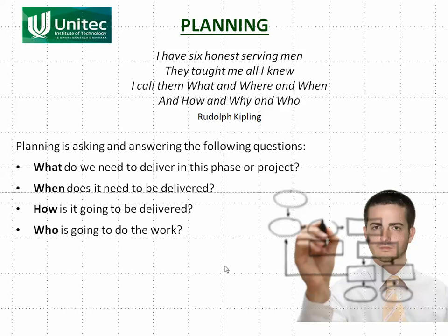So for example, with a project, if you were looking at a specific part, let's say we're doing a project to build a road, you're asking, what do we need to deliver in this phase or project? Well, obviously in the whole project you need to deliver the road, but you need to break it into smaller parts. So you say, what do we need to deliver? We need to do the earthworks.